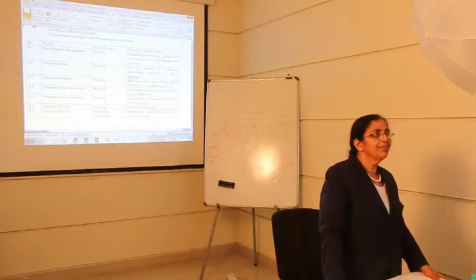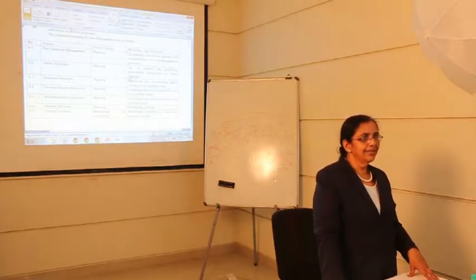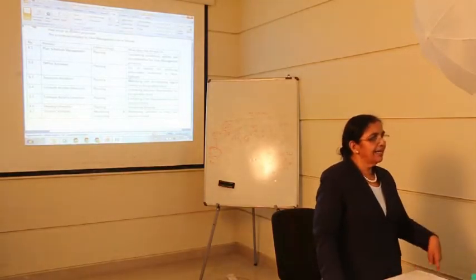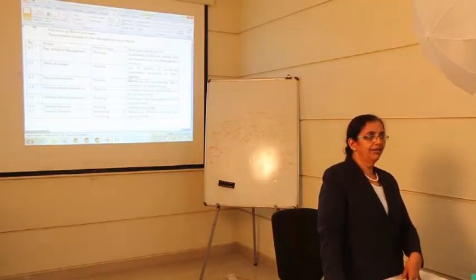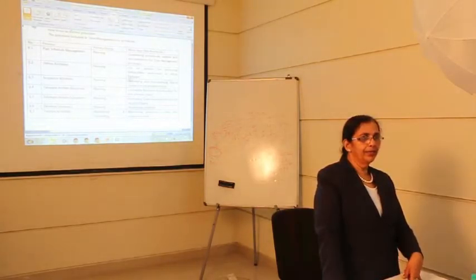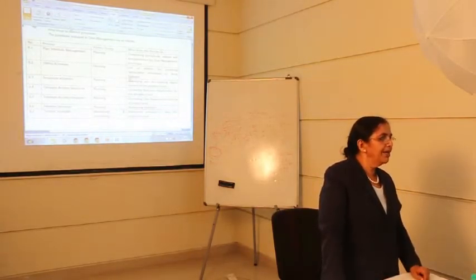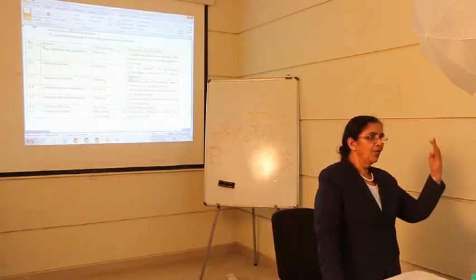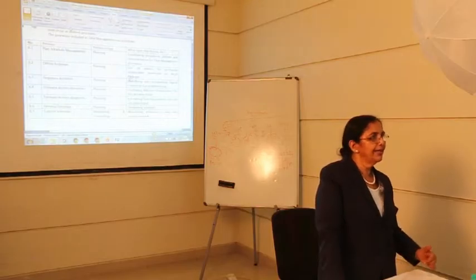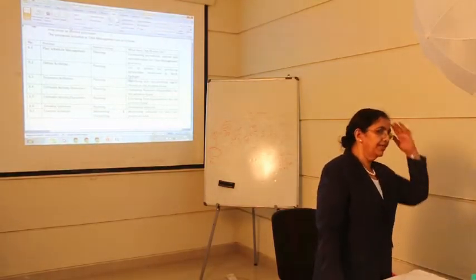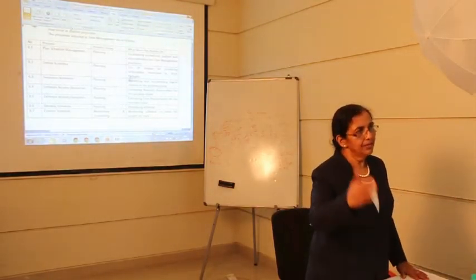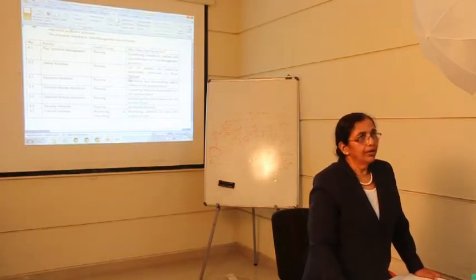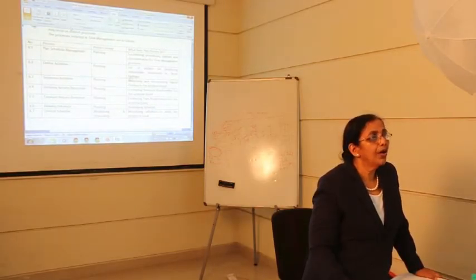Why I am saying almost? I am saying activity A takes 8 days and activity B takes 2 days. But not necessarily completing A and B will be over in 10 days only. There will be something in between, waiting period is required. You pour the cement and you need to wait for 4 days so that it gets cured. 4 days is some figure that came to my mind. I'm not saying 4 days, but you need to wait till it gets cured. Or there are weekends, there are holidays.